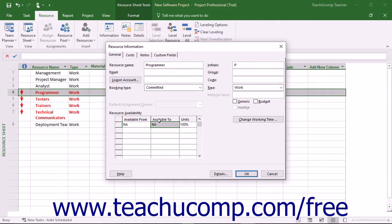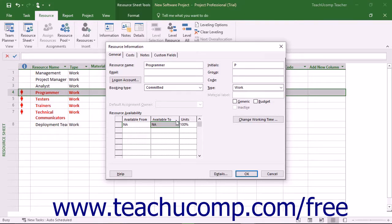Use the Available From, Available To, and Units fields in the Resource Availability table on the General tab to set the dates and resource availability for the resource.